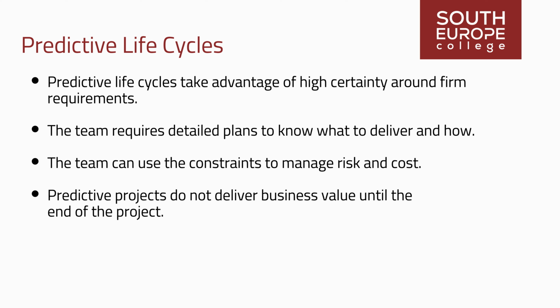By emphasizing a departmentally efficient, serialized sequence of work, predictive projects do not deliver business value until the end of the project. If the predictive project encounters changes or disagreements with the requirements, or if the technological solution is no longer straightforward, the predictive project will incur unanticipated costs.